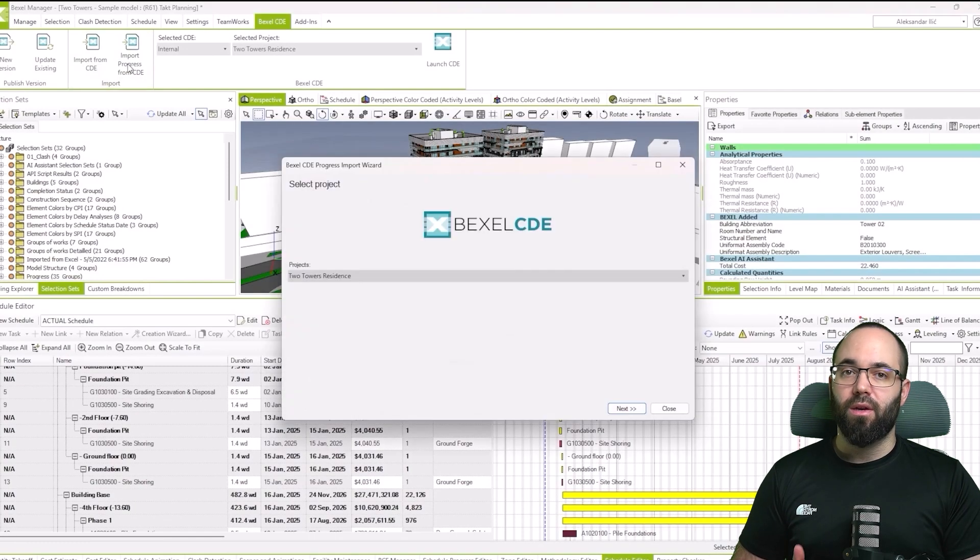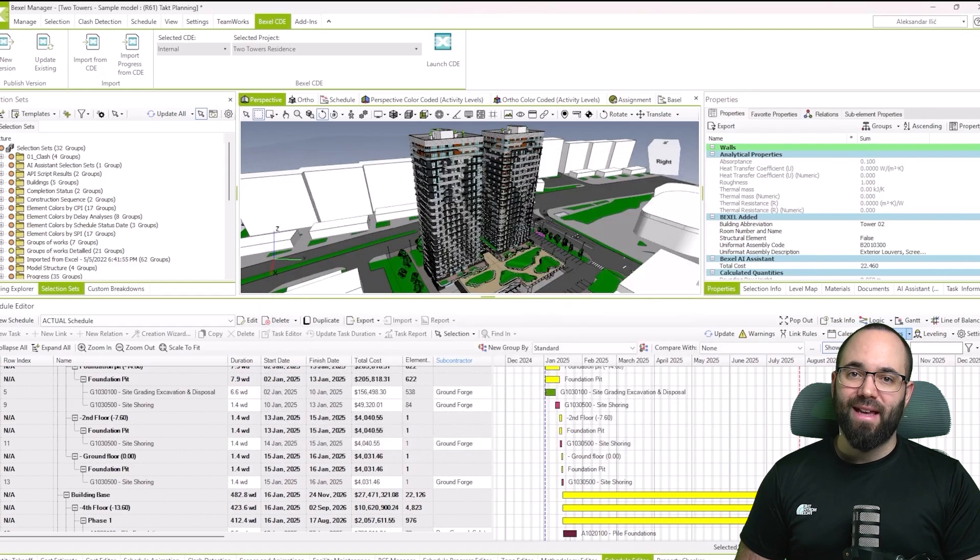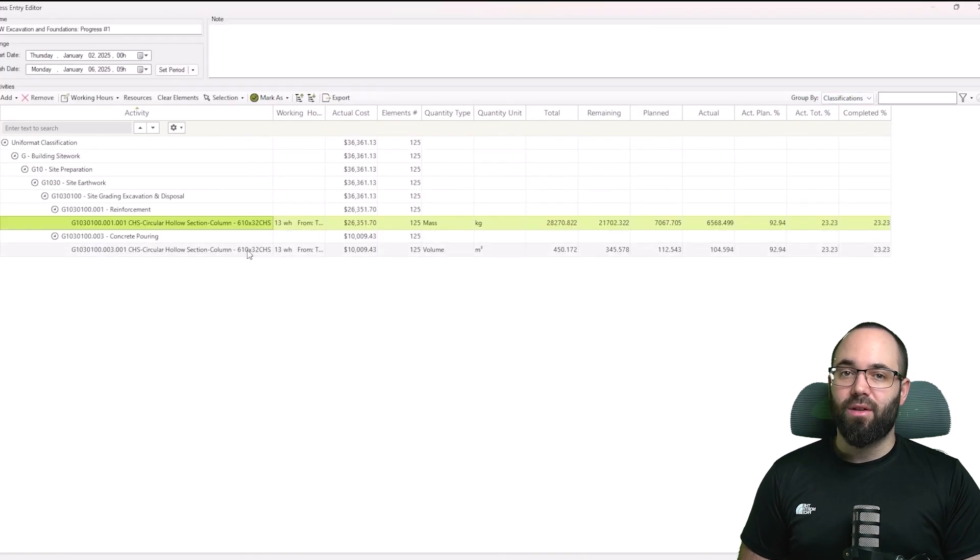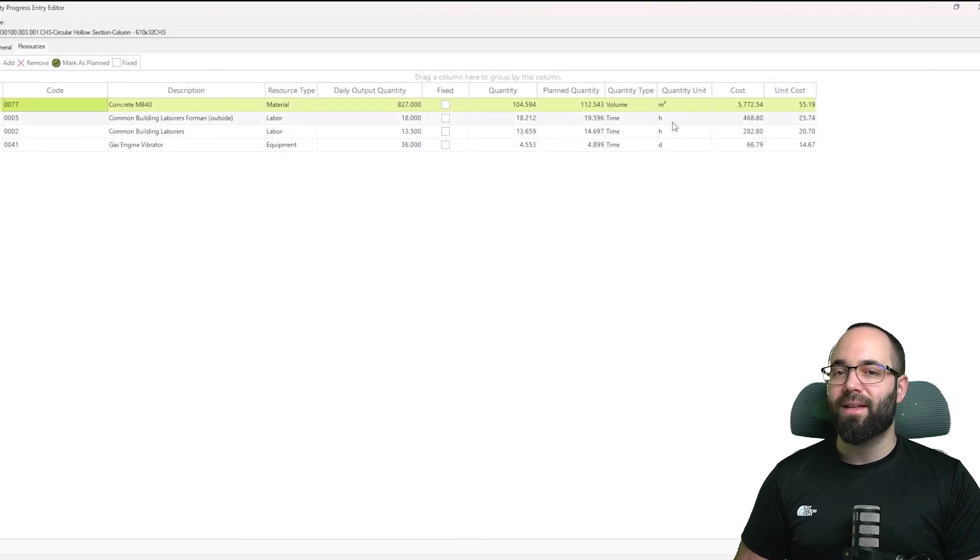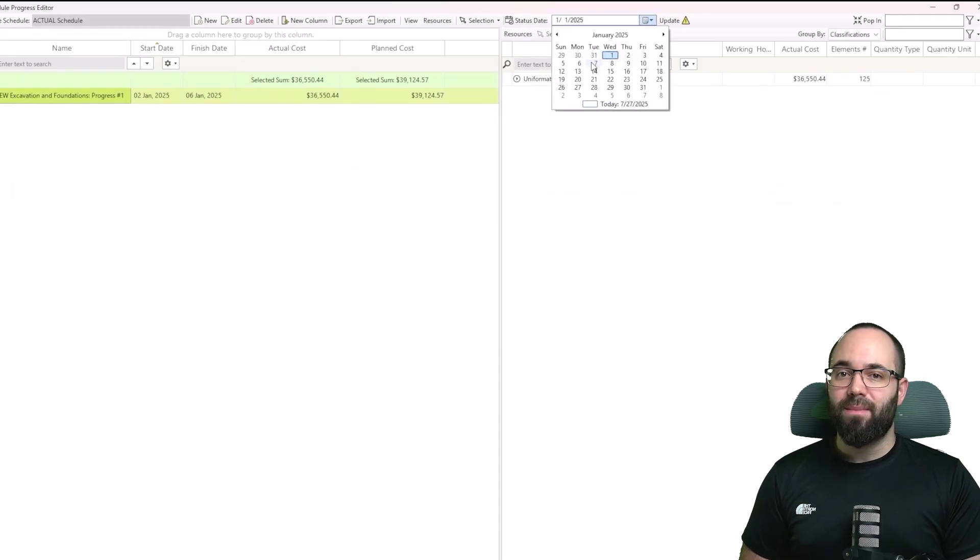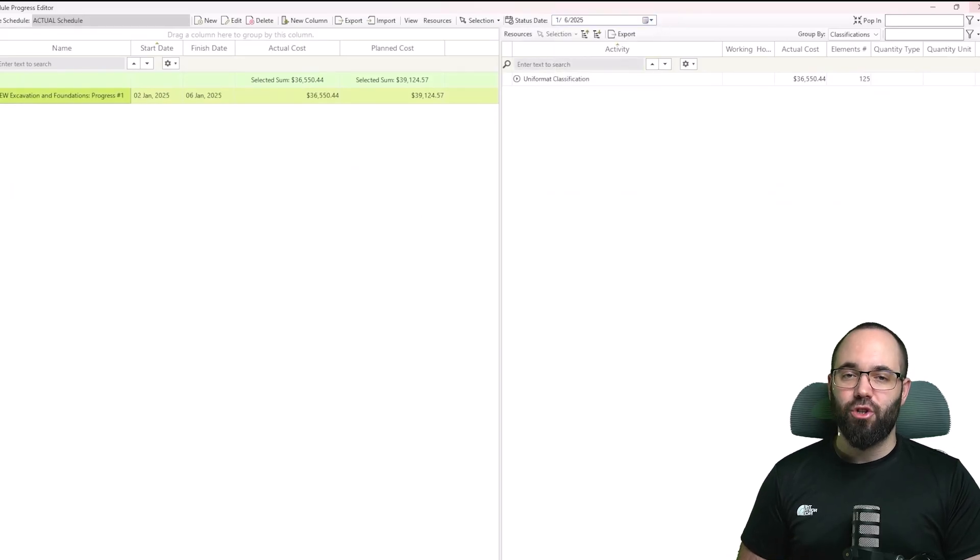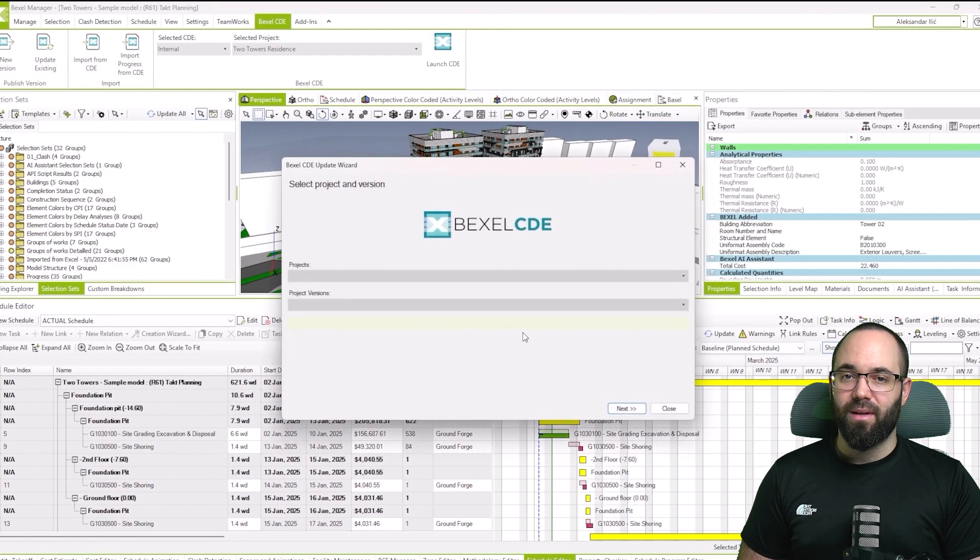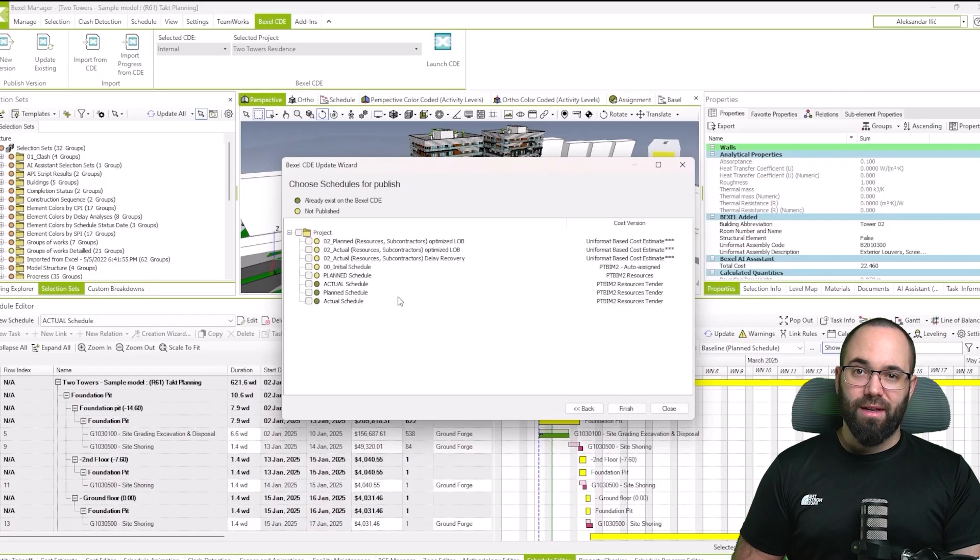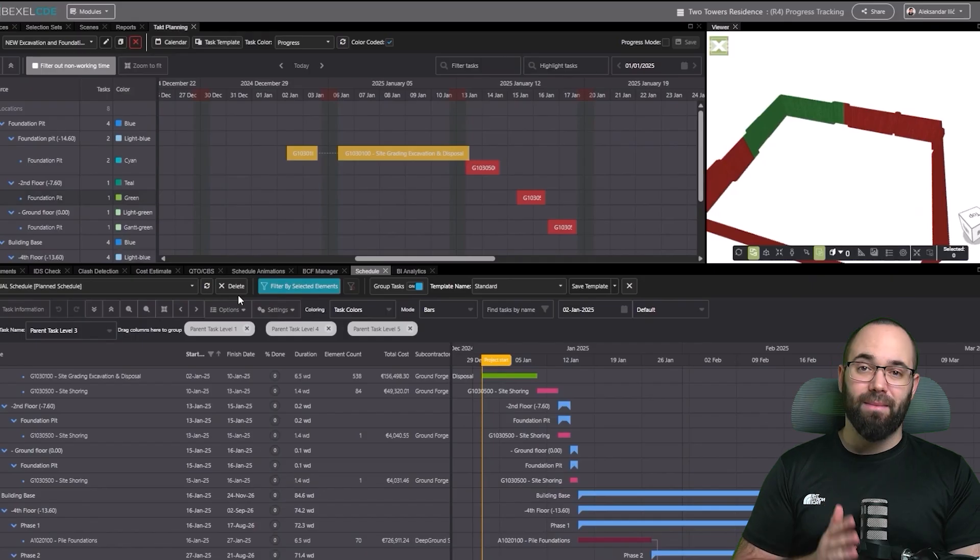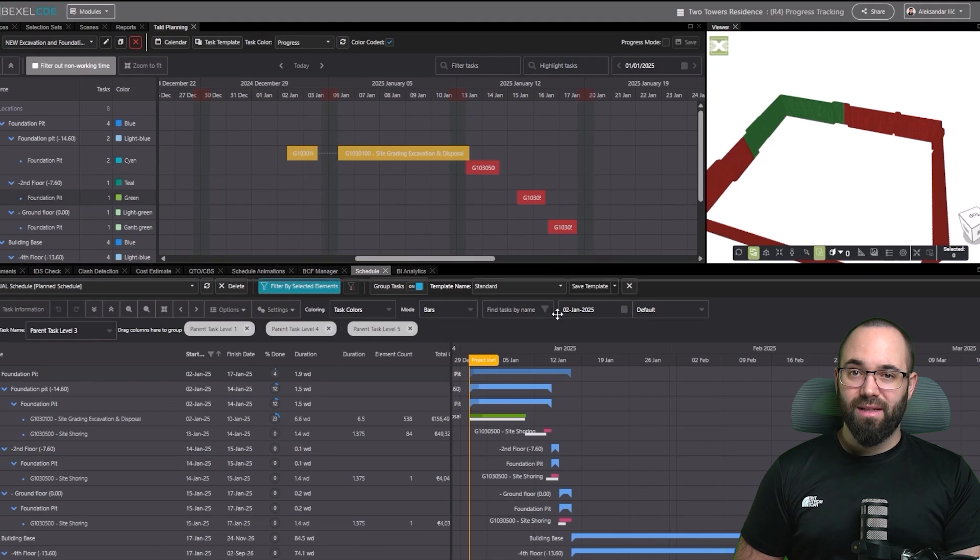With a single click, you can import all progress or only selected progress entries into Bexel Manager. If needed, resources or unit costs can be adjusted before updating the status date. Once the update is done, the progress can be compared directly with the baseline schedule, giving a clear view of how the project is developing. The updated schedule is then published to CDE, where you can see baseline and current progress side by side.